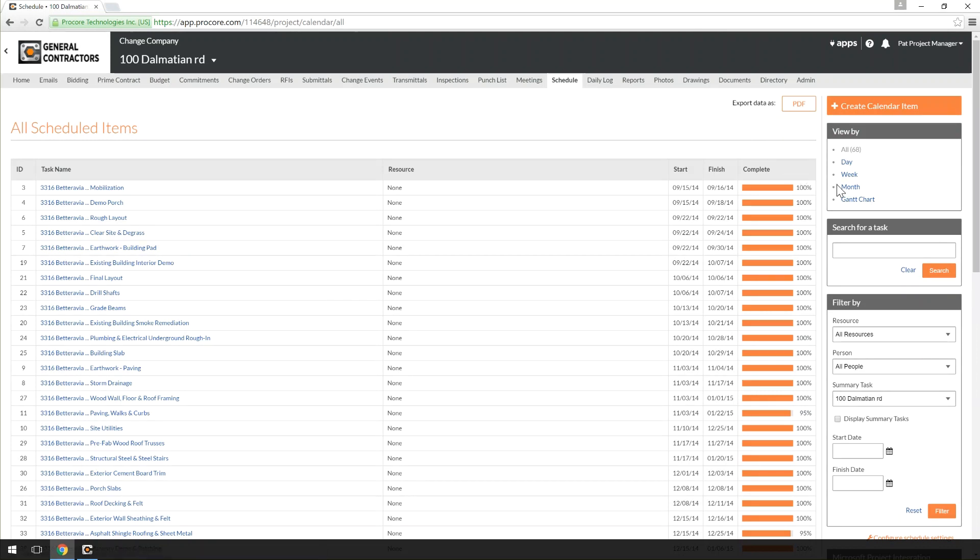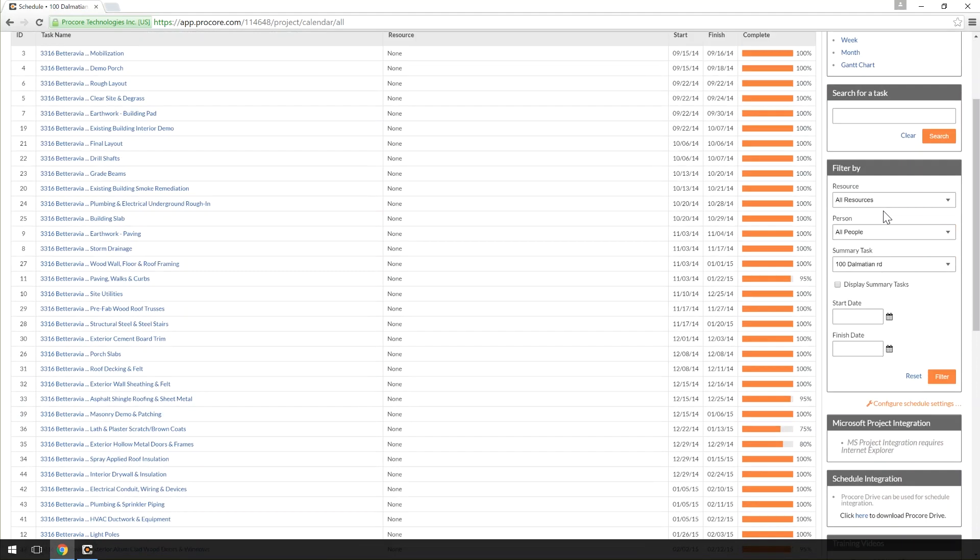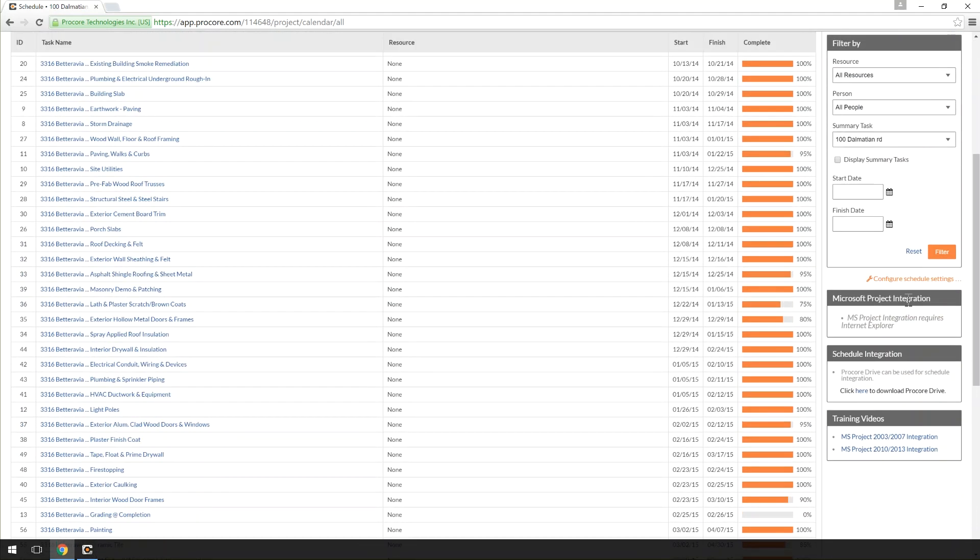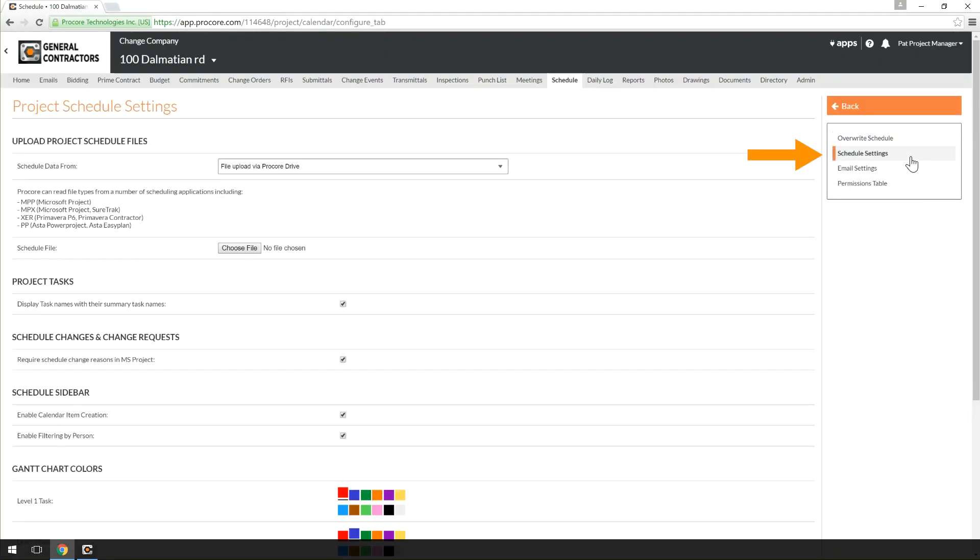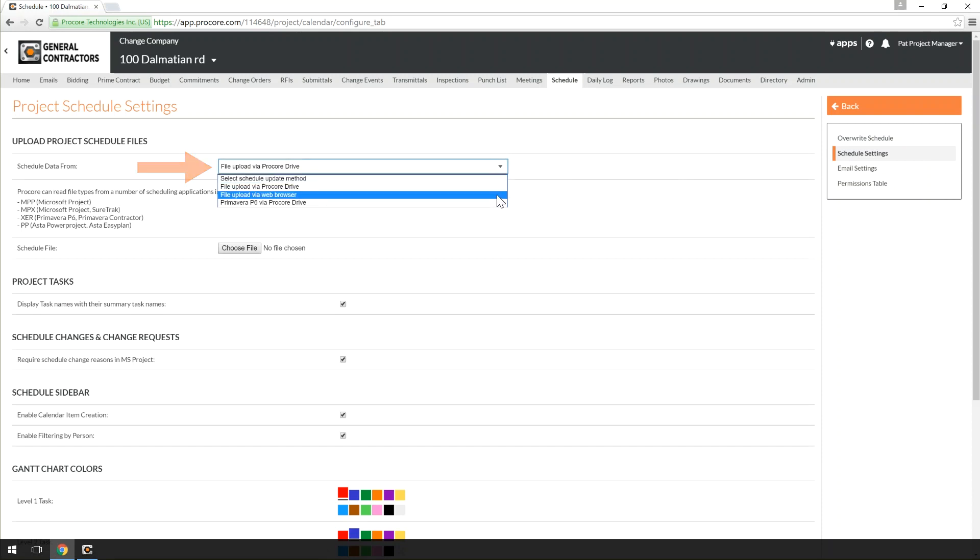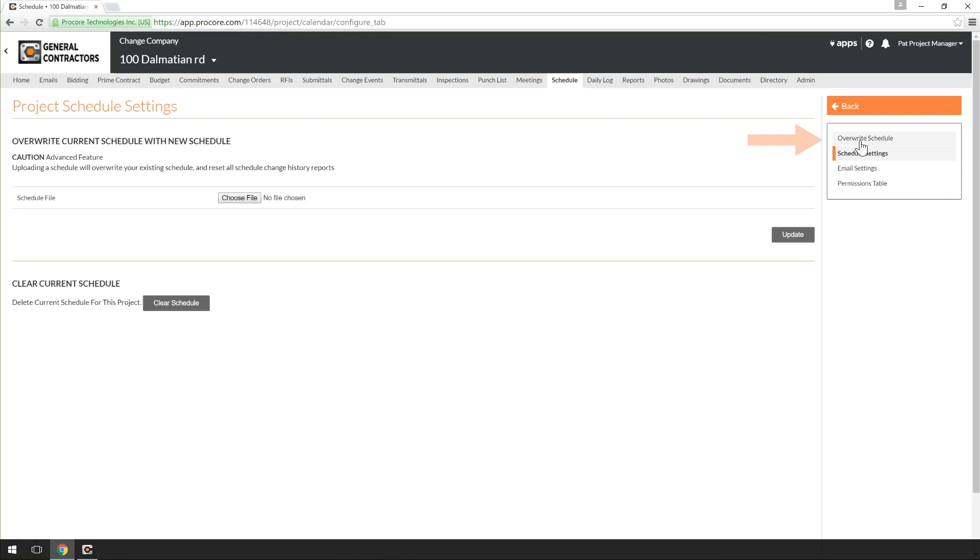However, if you cannot use Procore Drive, you can navigate to the Schedule tool in your Procore project and click the Configure Schedule Settings link. On the right, click the Schedule Settings page. On this page, you will be able to set the Schedule type and, in the Overwrite Schedule page, you will be able to upload your Schedule file.